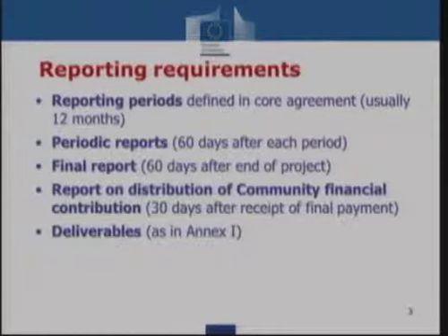The final report has a bit of a different template, which is also available. It is in addition to the periodic report for the last periodic report, which includes the final publishable summary report of the whole project, so covering the results of the project, the conclusions, and the socio-economic impact of the project.